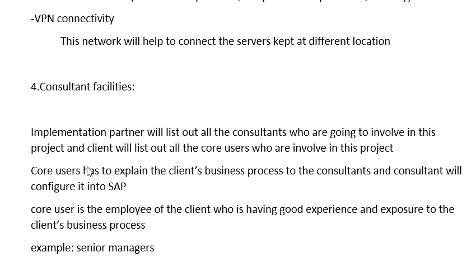After that, the implementation partner will list out all the consultants who are going to be involved in this project, and the client will also list out all the core users who are involved in the project. Core users have to explain the client's business process to consultants, and consultants will configure it into SAP.